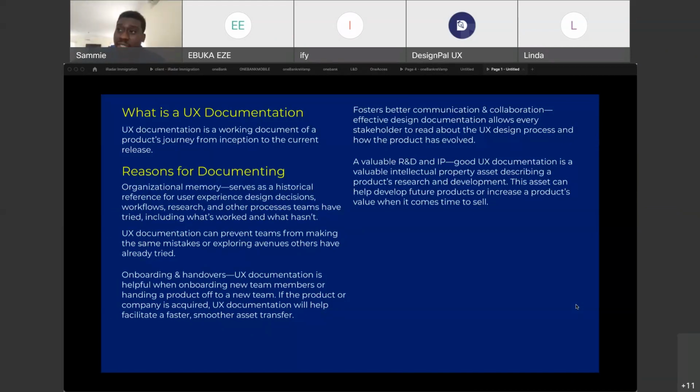We're at the research phase. And it might work the first time, but if it comes to the third week or the fourth week and they say, what are we doing in the research phase? Then he thinks he's just investing a lot of chunky money, like pouring water into a basket, and nothing is yielding fruit. But the truth is sometimes timelines might exceed themselves. Even if I set maybe two or three weeks for a research phase, due to new discoveries or new outcomes, it might stretch. So we need to account for that with documentation.